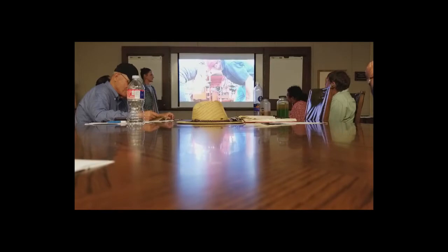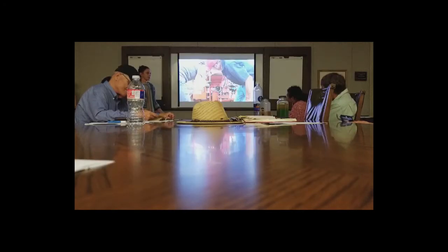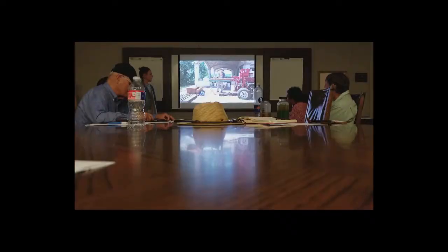Making the blocks requires procuring the materials, so you have to know what materials to procure. Luckily, I had a good recommendation from Ron on a material that he and Christine had been using for their home. Once you procure the materials, the hardest part of making the blocks is mixing the materials. If you can find a soil mix that's already to your satisfaction, you get to eliminate part of that. That's why we ended up using this soil mix, although we still had to mix in our stabilizer. We tried a cement mixer and a mortar mixer just to compare the two.